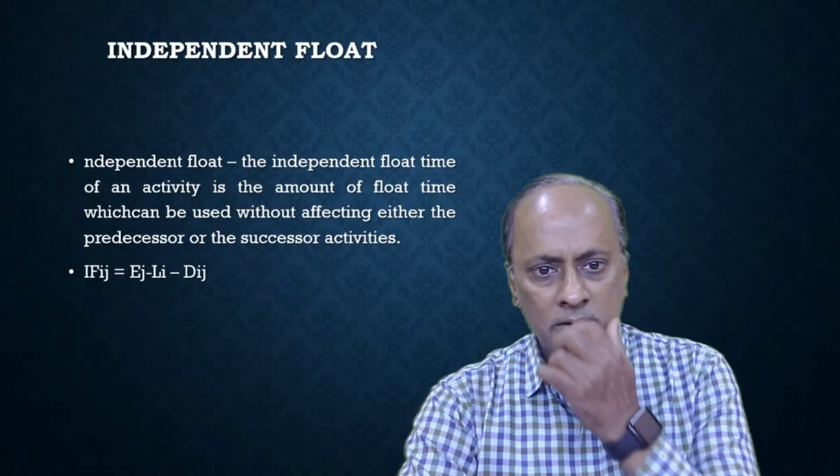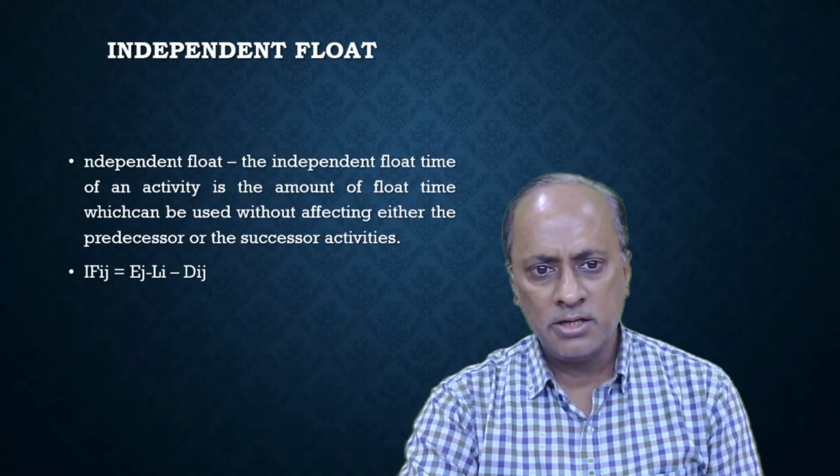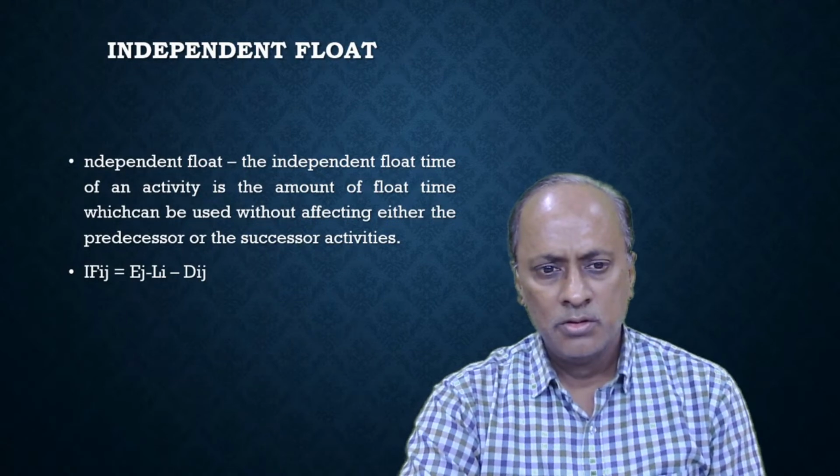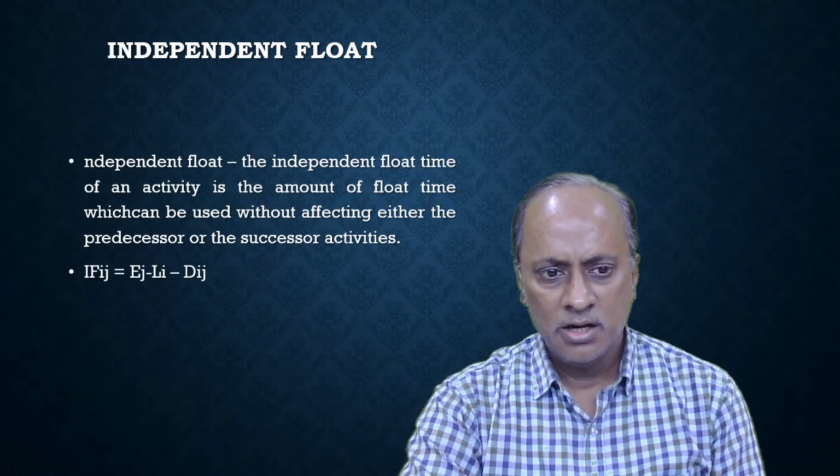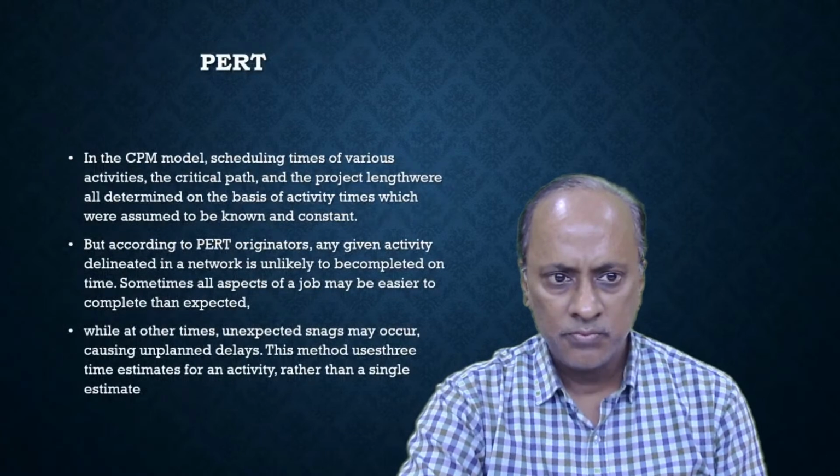Independent float. The independent float time of an activity is the amount of float time which can be used without affecting either the predecessor or the successor activities. And we can calculate accordingly.